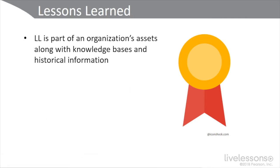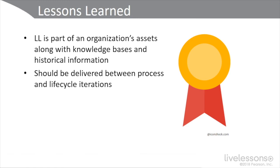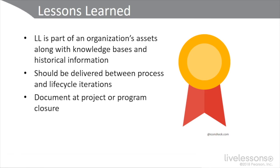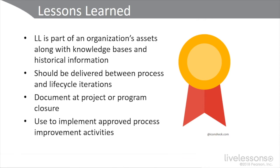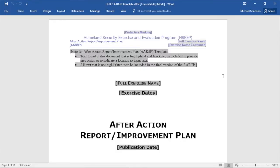Another key concept is lessons learned. Lessons learned is part of an organization's assets — not a physical asset but a logical, intangible one — and it goes along with your knowledge base and historical information. It should be delivered between processes and lifecycle iterations, not just at the end. You will document lessons learned at the closure or disposition of a project or program, and use them to implement approved process improvement activities. You might also use an after-action report, commonly used by FEMA, Department of Homeland Security, and the military, and the two often work hand-in-hand.